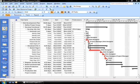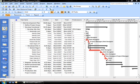So in shortening your critical path, you may over-allocate your resources. And that's not healthy for anyone, the person being over-allocated or the project manager who's going to have to deal with disgruntled employees. So we want to avoid that at all costs. And we're going to use the power of Project to take a look at where we may have over-allocated our resources.